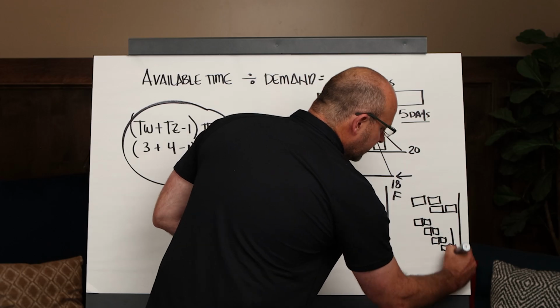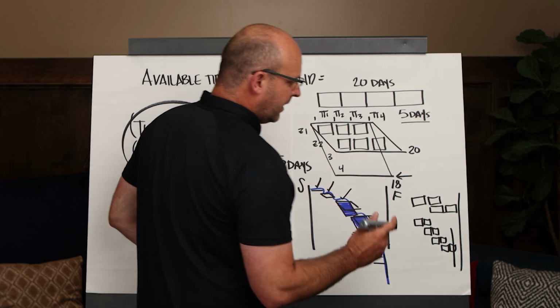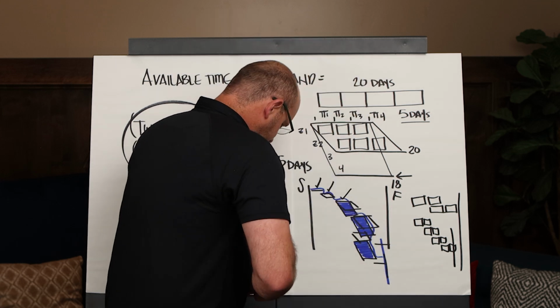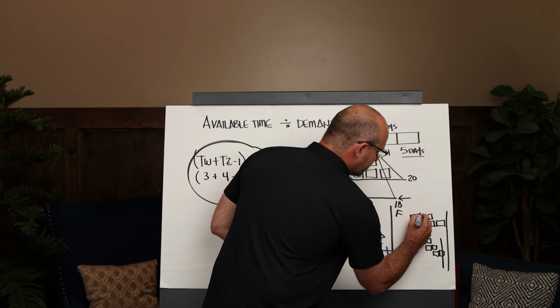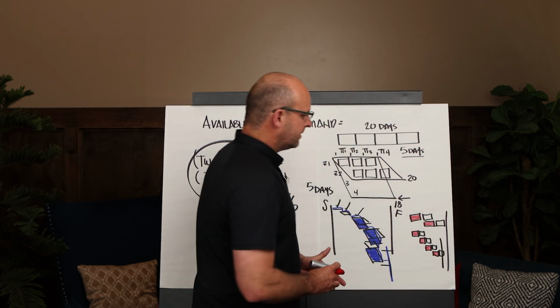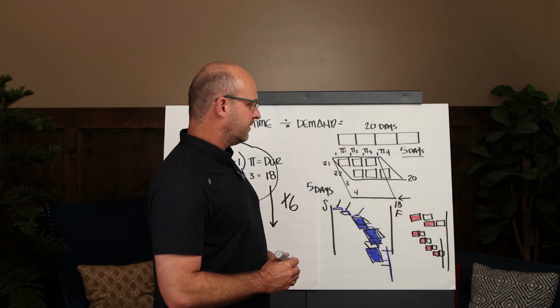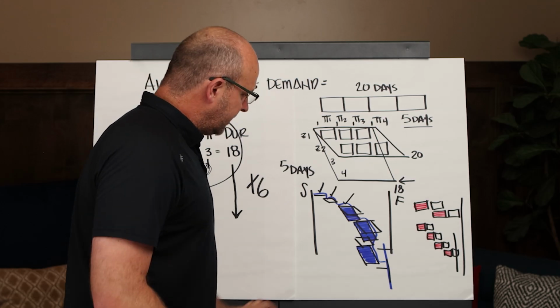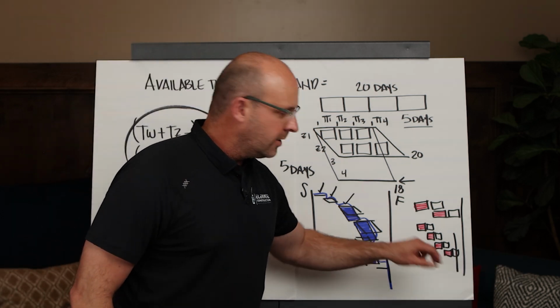And what you have here is the phase starting to narrow forward, but I want you to note, I'll do this with red. This original trade time, the trade still has that trade time. It's equal from here to here, but the overall phase is coming forward. And so you can start to narrow your construction projects by using this formula without hurting trades.